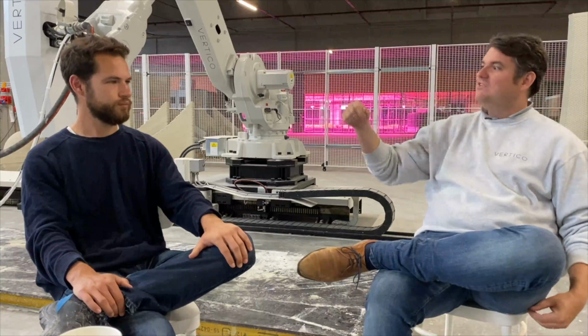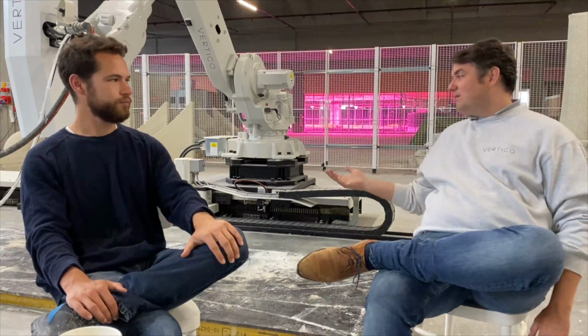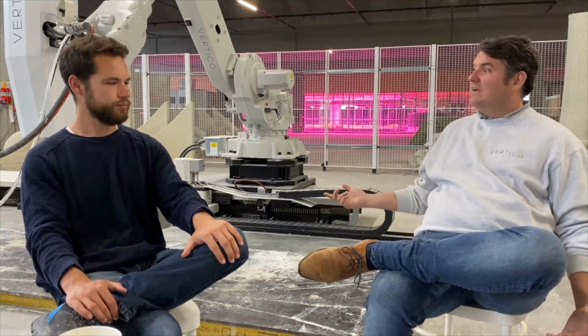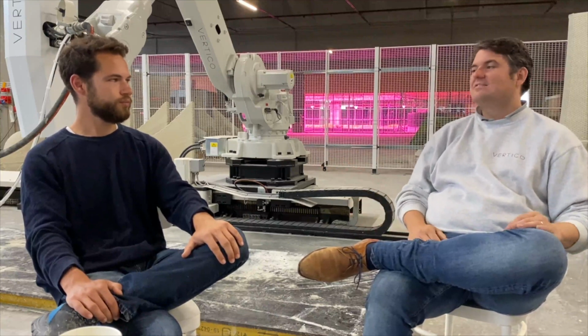But we had to spend some time figuring out how that logic would work of speed changes to get the layer height the right size for the object. After a lot of practice, we're pretty good at that, but that's usually where most of the time is. Even if you have a 500 euro per ton material, you can easily work out how heavy your object is going to be and work out what the material cost is for that object. But there's no way to say that an object itself will cost a factor of 1, 2, 3, 4, 5, 6, 7, 8 of the material cost. It's sadly not that simple yet.